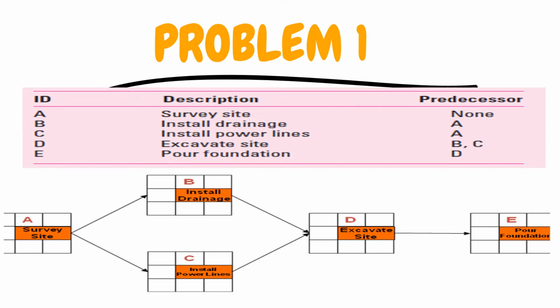Right, so here is another very clear illustration of the same problem, and you can see the network diagram illustrating various logical constraints that must be addressed for completion of this project. Now, another question asked was to identify the burst and the merge activities. You can see activity A is bursting into two separate activities.